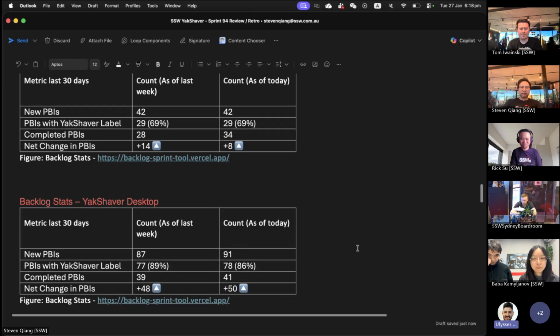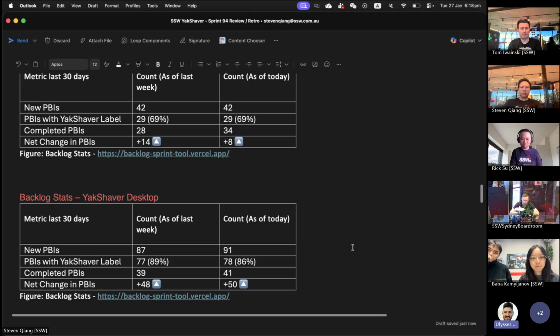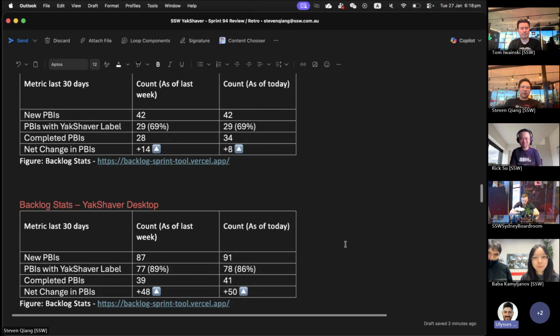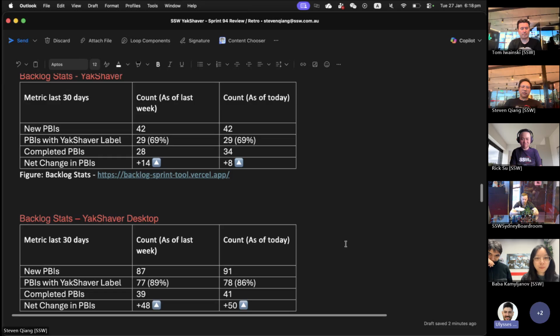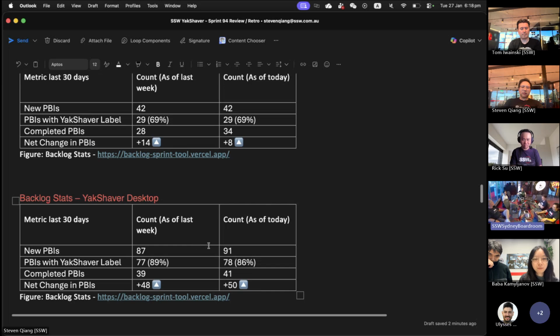Well, but we've also got a net increase of about 50 PBIs every month, I guess. That's a lot. That's a big backlog for you to handle, and getting bigger substantially, right? We want the net change in PBIs to ideally be 0, because we want to be getting as much work done as we're gaining. Yes. Yuli wants you to work harder. Right.